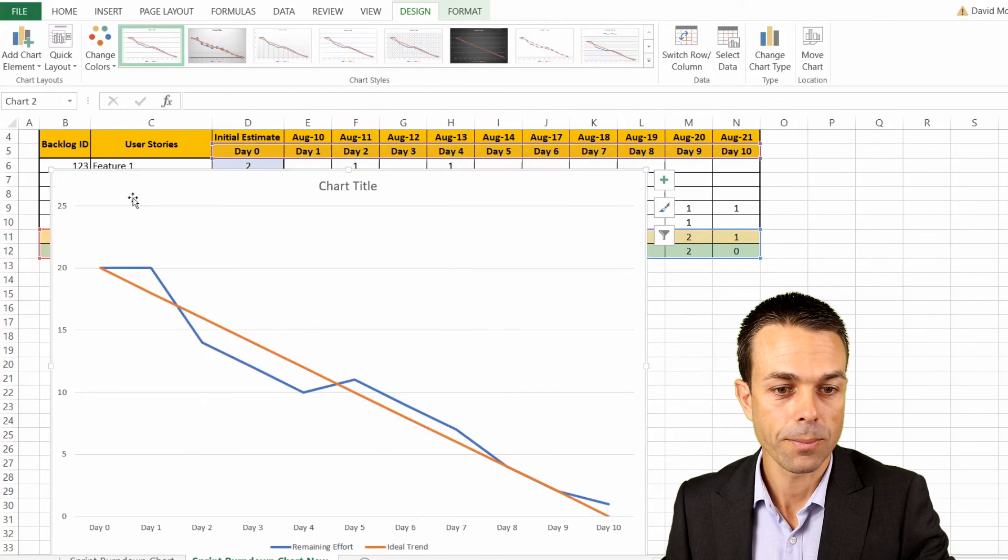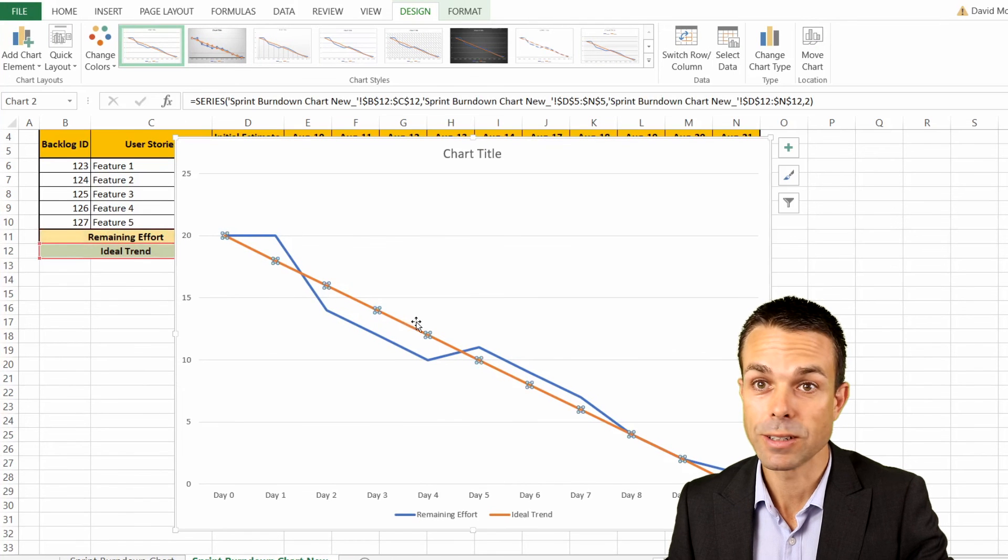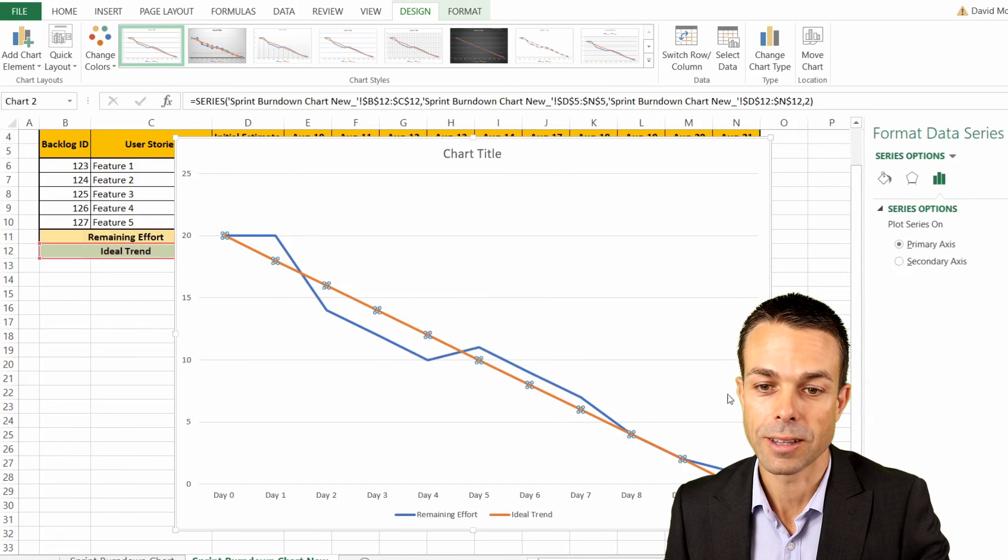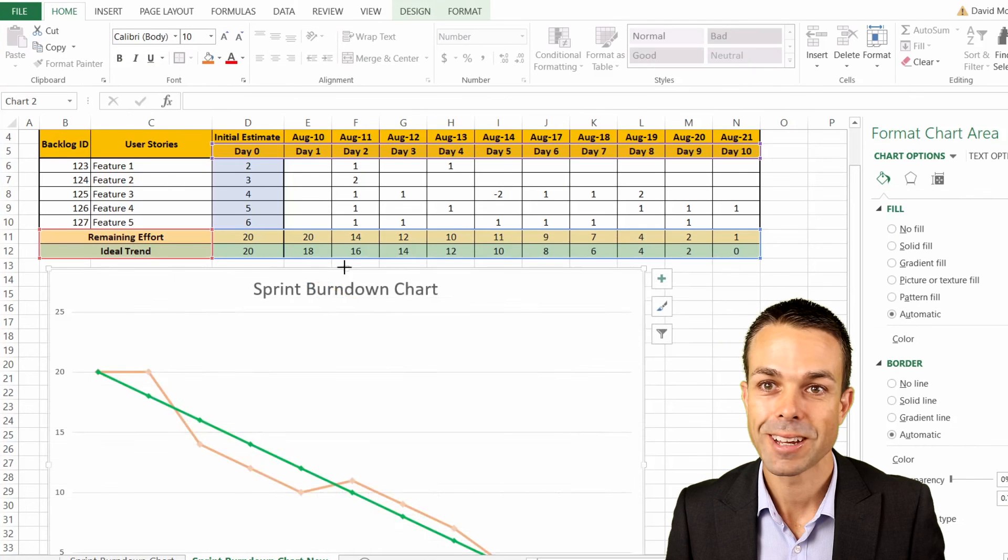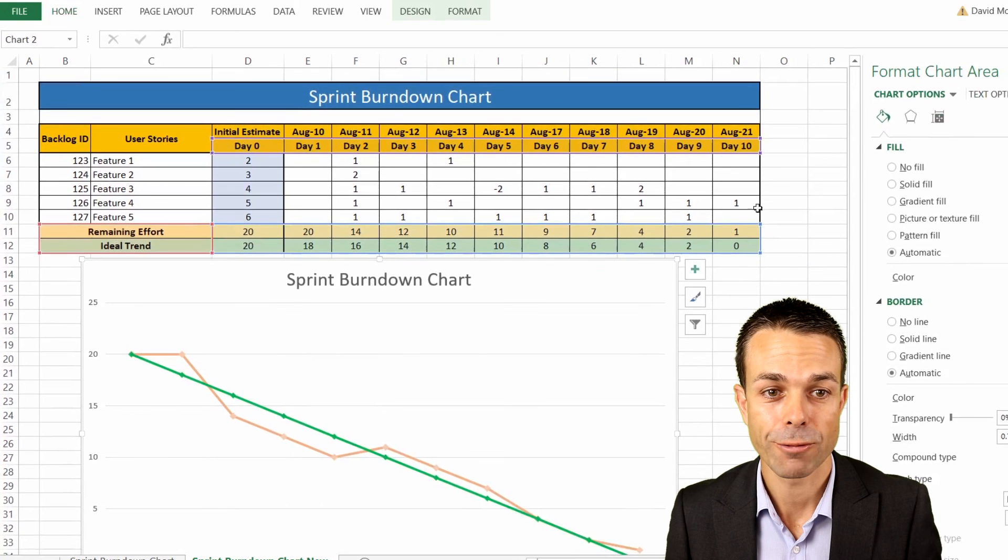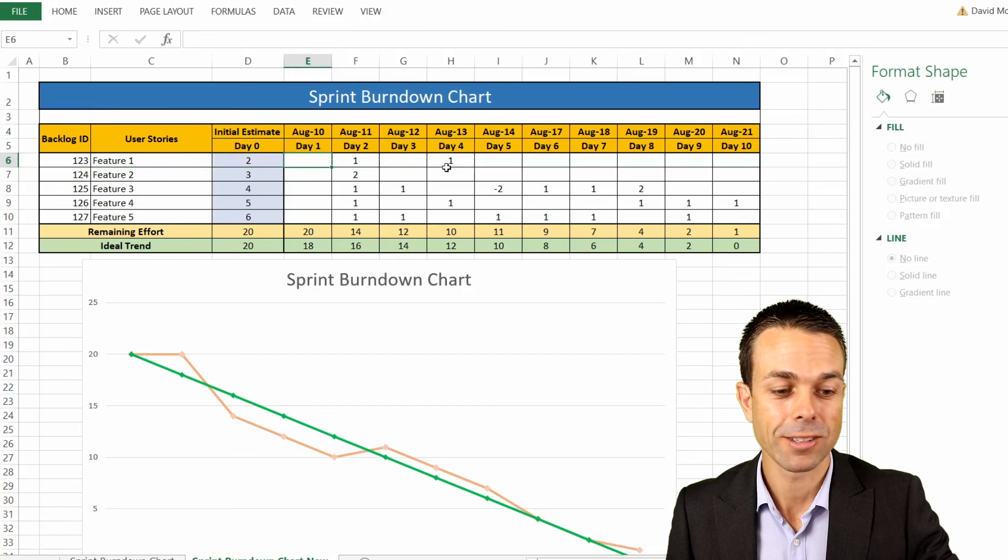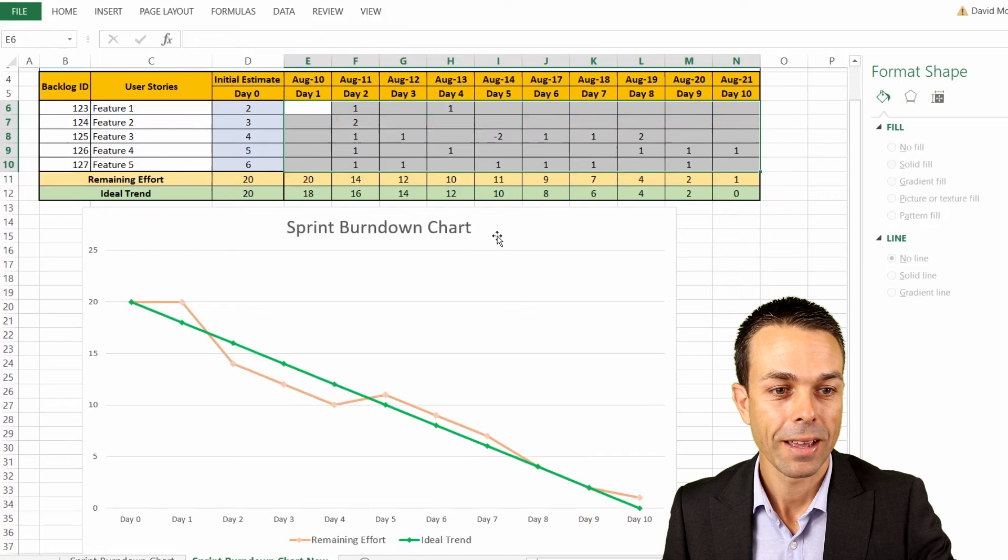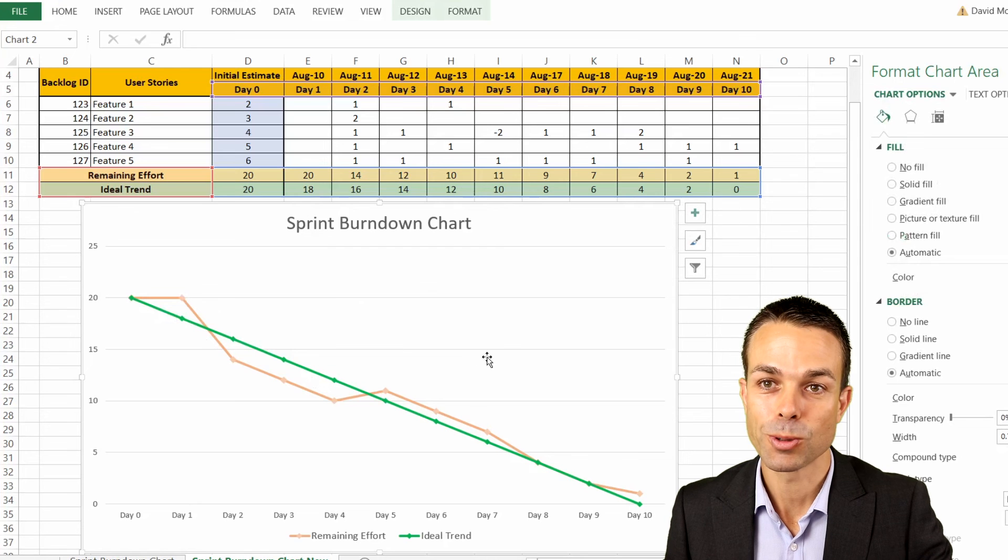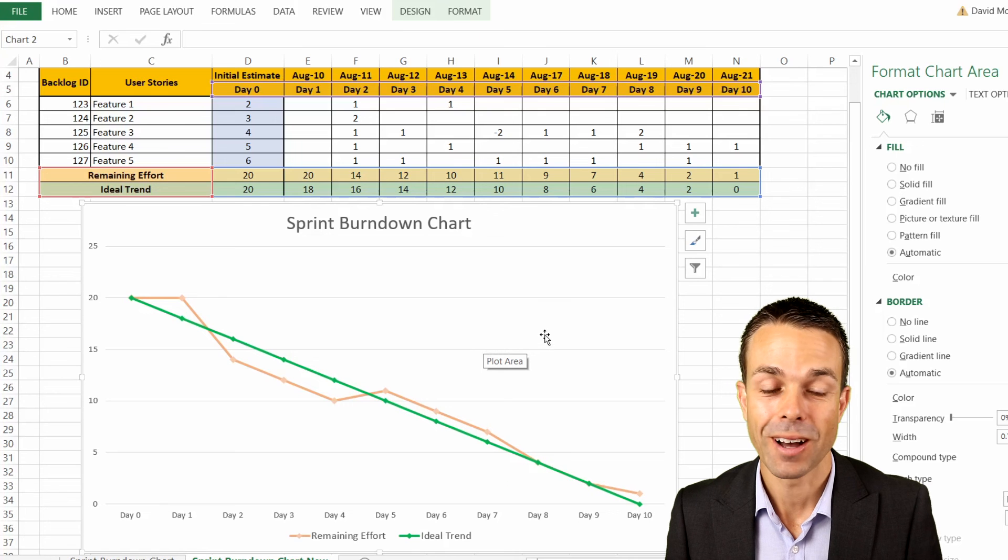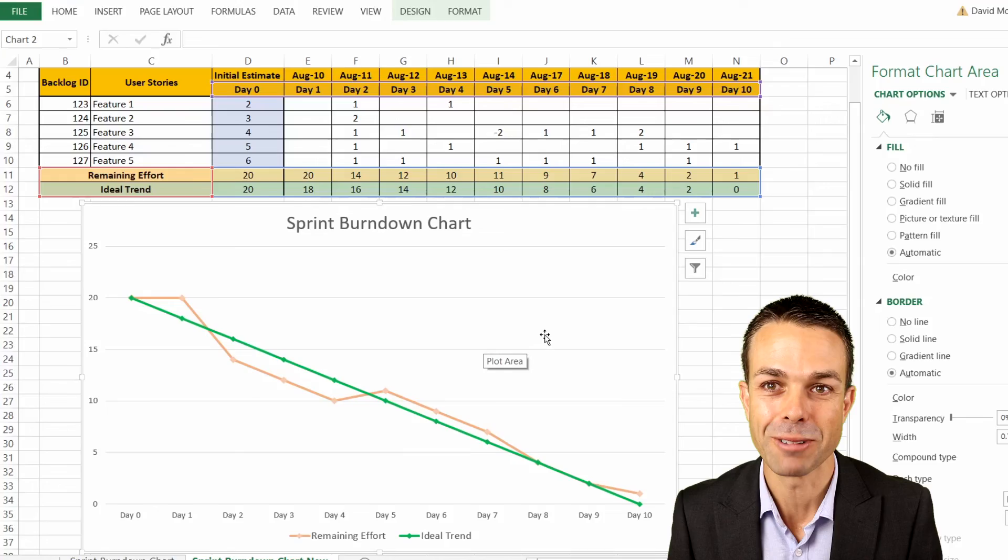If we click OK, now we can see that we've got a chart that has our ideal trend in orange. We can actually change the colors of all of these if we just right click and say format those chart options. Now it's starting to really take shape. You've created a burndown chart from scratch. As you can see, we've got our features, our bugs, the initial estimates, and then the amount of work that we've actually completed over that time. Then we've created that into a burndown chart where it shows us what our ideal trend should be and what our actual trend actually ends up being. That is the burndown chart in Excel. I've really enjoyed creating this with you and I hope you've enjoyed it too. I'll see you in the next video. Bye for now.